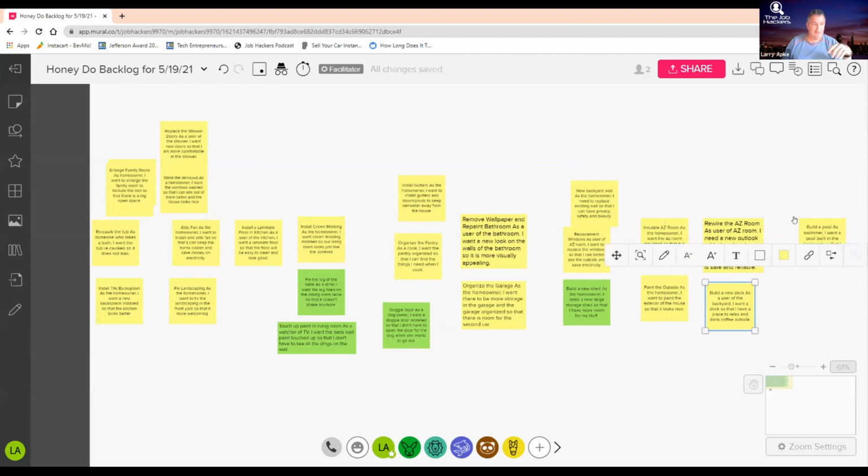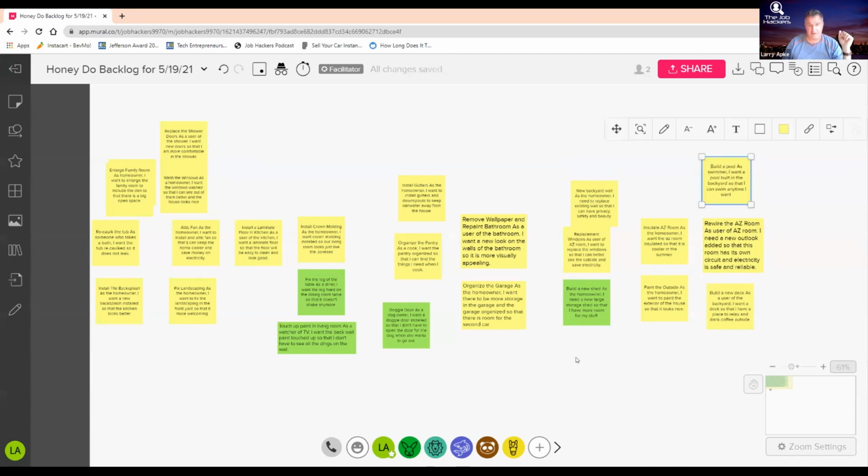I'm not as concerned about the stuff on the right-hand side. I would probably ask the question, since I'm going to try to smush it into 9, here's one that's on its own. Does it really belong on its own, or should it move into another column? If you say it belongs on its own, I'm going to look for another one. This one's on its own. Is it okay if I move it over here like this? Now I've got my 9 columns. I could have fewer. I never know how many I'm going to have before this starts.